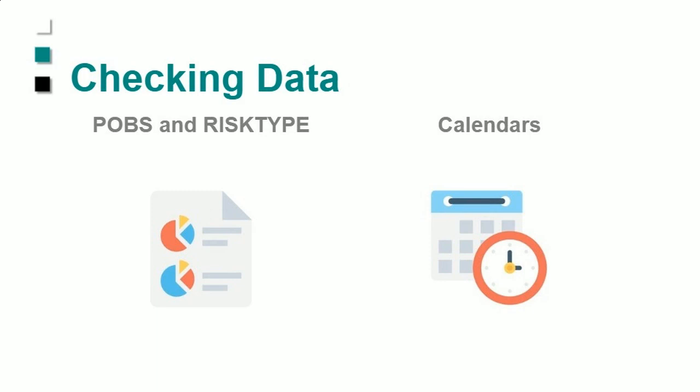We deal with calendars. Calendars are an important piece because you could have collisions of data, which you do not want. You do not want your calendar to be changed by an imported file. That's very dangerous, so that's an important one.